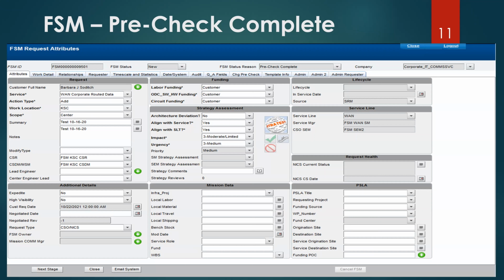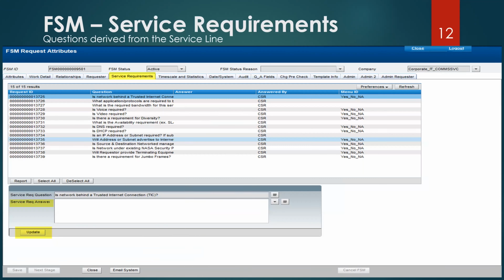We use that to populate there's a date field on the change form. We populate that. That one gets a little tricky on us sometimes because when the ESD request comes down, the customer wants it tomorrow. By the time we get the request, it's 3 weeks old because it took them a while to go through their approval process. So that gets over here in the dates in the past, it won't build the change request because the date's in the past.